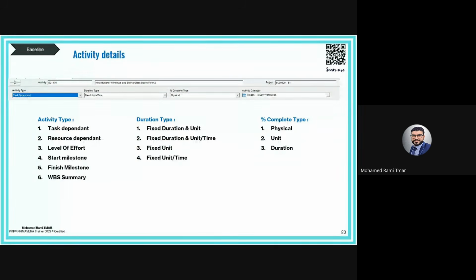All these are finish points for the project. Okay, and usually there are contractual milestones defined in the contract, and we usually use those milestones on the first page of the schedule to give a high level summary of the schedule.